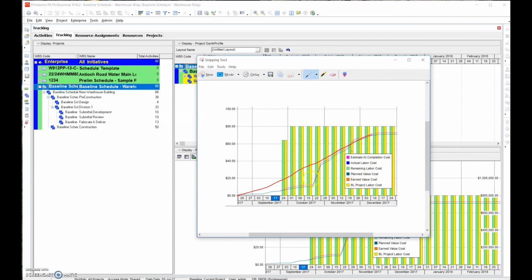And you can see that about halfway, most of our costs are on the back end. You want to get this line as close to the theoretical line, that's the line I just drew, as possible, because that's where your costs need to occur. You can tell if you're front end loaded if your line looks more like this, and it crosses really soon. So we want to get it as close. We would want to move dollars around to try to get it to mirror that line as close as possible until about the halfway point, and then it goes and it completes.